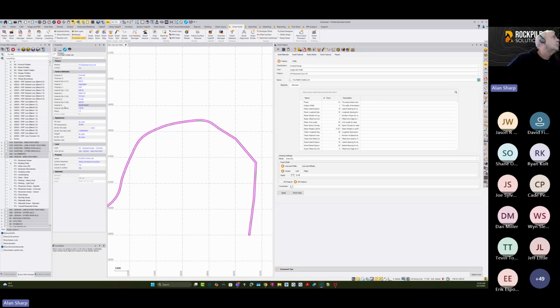If I can find it, material 4. Yeah, so here it's saying rebar, dowel basket, tie bars. So we need 908 tie bars along the edge of this road to build that. Okay, and in terms of dowel baskets, we need 109 dowel baskets to build this out for the joints for the concrete pavement that we're working with.